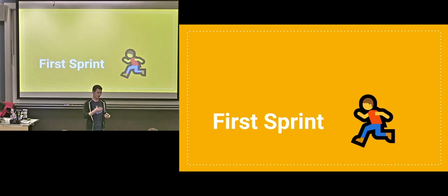It didn't really make sense to do a vertical slice and an alpha and a beta because everything would have only had about 3 weeks in between each one. And that's not really enough time to make any kind of big progress.